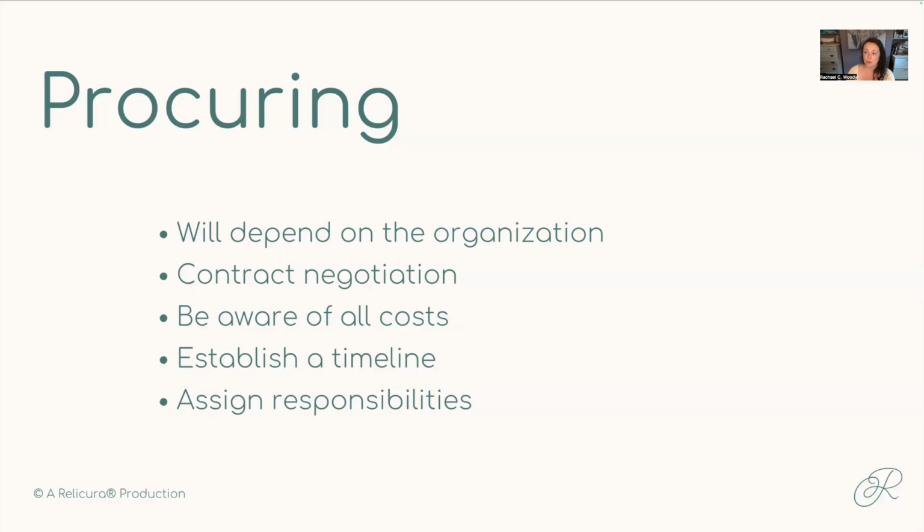There's usually a procurement person or department that you will then work with to establish the specifications. The vendors you've reached out to that meet your criteria, you'll invite them to submit a bid. And it's at that point an official procurement process to go through in order to help meet whatever sort of tick boxes you need to for compliance.